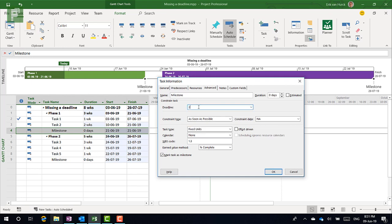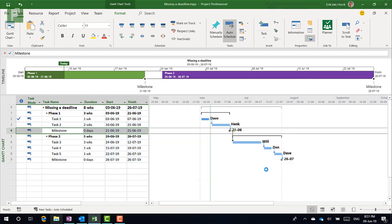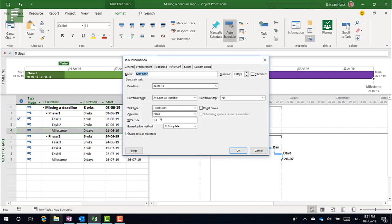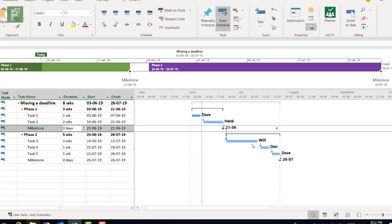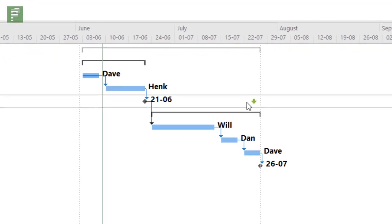For this one I said that we're going to make this one just fine, so let's set that to the 24th of June 2019. What happens is there's not so much visible on the right side, but on the left side you'll see that there is a little green arrow. I'm going to skip that deadline to a later date so that we have better visualization of that. Let's set that a month later. Now you see that little green arrow here which tells us we are still in the green - this is still a deadline that I'm going to reach.